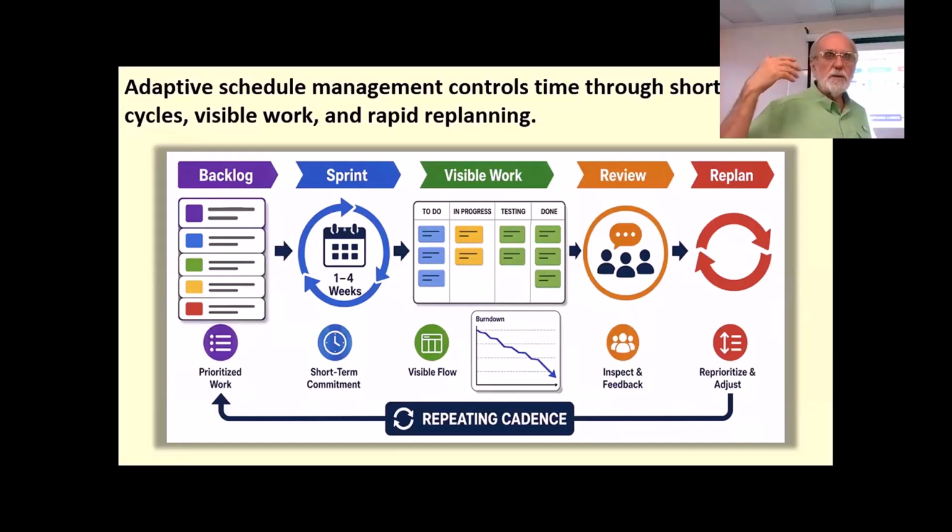And the reason they call it a roadmap is because we're usually looking at anywhere from, if I put it in months, assuming a 2-week sprint or iteration, they're usually looking out maybe 3 months ahead, and they keep rolling that roadmap out as they go. That keeps everything current. This is really effective on projects where we don't really know what the final scope is going to be. Okay. And so that's how we do that here.